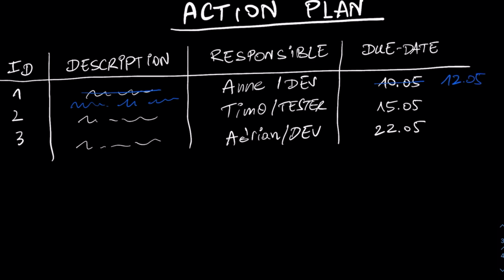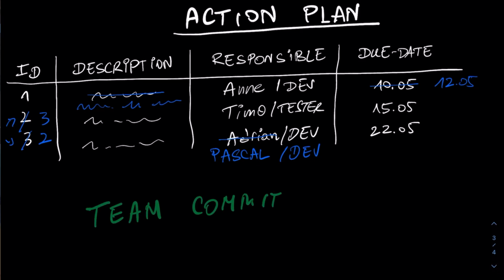And the item owner, the one who is going to be responsible for that ticket, needs to commit to the scope, needs to commit to the action order, whether it should be taken first or second or third, and last but not least also, of course, the due date, whether he or she can finish that particular action item within that predefined due date. After internal negotiation with the team members, let's assume now that the action plan is mature enough and we can distribute it.